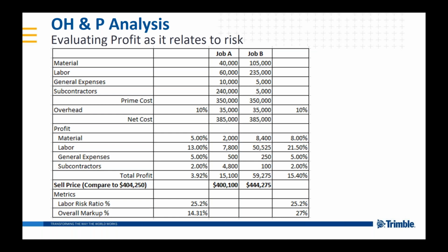Thinking about, we talked earlier about reduced height workspace or working in a crawl space. Those are tough. If you're in there all day long, bent over, especially if it's like 4 feet high, on your knees, I would probably put a pretty steep factor, 30 to 40%, on that type of job. But again, these are subjective. It's something that you would need to look at on each individual case. And above 10 feet in height, I would probably say it's 1 to 2% per foot above 10 feet.